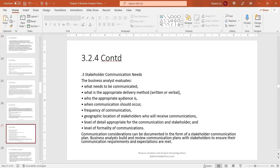Stakeholder communication needs are also important. You want to understand what works best for stakeholders — for instance, are they currently using a collaboration tool like Slack for questions and answers that don't require a face-to-face meeting? You also need to determine how to communicate status: is it via email, or working with the project manager to include statuses in a weekly report so communication is clear and people aren't confused?